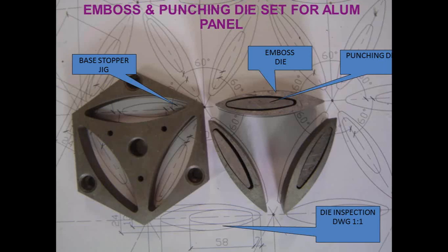So this die, what you see over here, is not simply made out of something available. We called up a machine manufacturer, and he said that presently he did not have any machine which could do this process, because the metal has to be embossed, with 2 steps of embossing plus a cutout. So it was a special task even for the machine manufacturer at this stage.